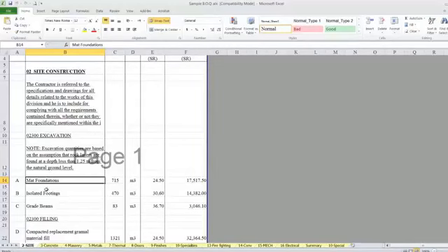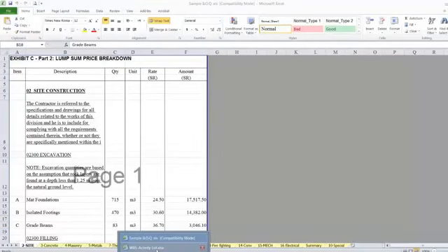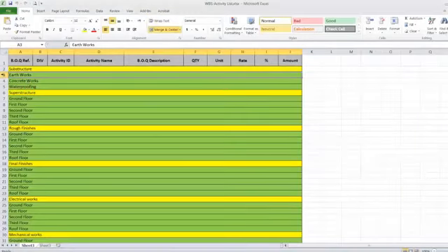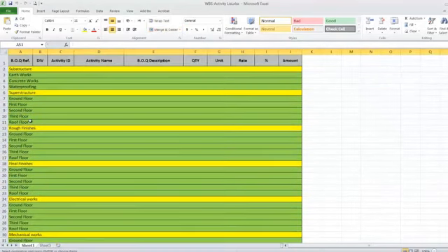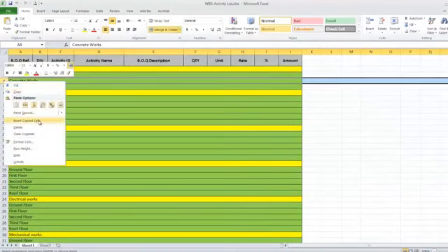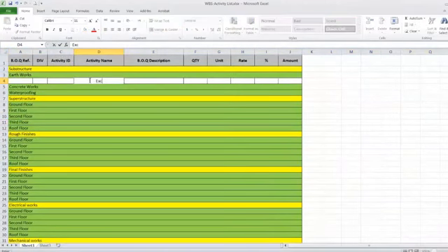So the first thing I will make the excavation. I have excavation, and I have three types of excavation: for the mat foundation, isolated footing, and grade beams. So I'll create first thing in my WBS an activity under earthwork. I'll create an activity and I'll call the activity excavation work.